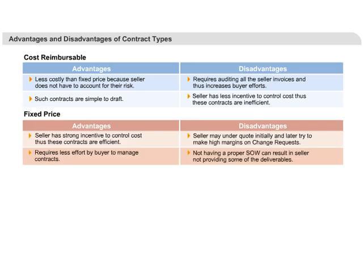In case of a fixed-price contract, the biggest advantage is that the seller tries to control the cost. But the disadvantage is that sellers can underquote initially to get the contract and later try to overcharge if there are any change requests.